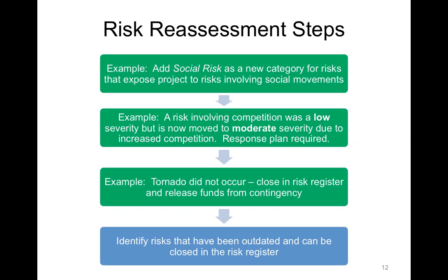Technically, it's a risk. We did identify it. It's not an unknown unknown. It's not like a black swan event, which is an unknown unknown. We knew about it. We identified it, and we assessed it. We had a contingency plan in place, which was to mitigate the impact. And we no longer have to pay for that plan. We can take that out of contingency, and we can release those funds from contingency and move on with the project.